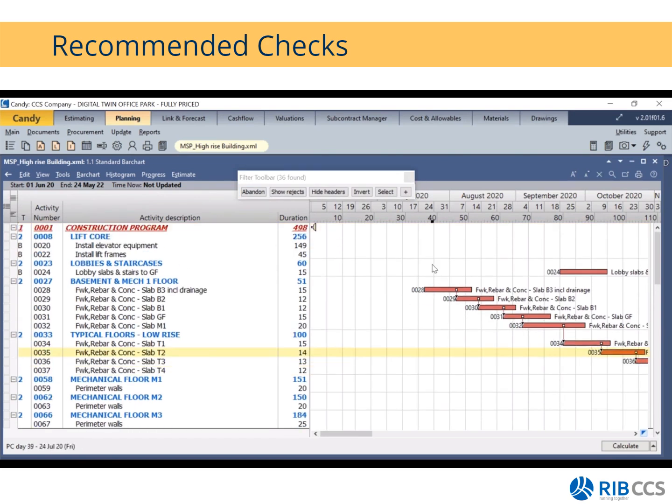those open-ended activities. All right, if you have a B-type activity, and if there's no succeeding activity that's going to happen after it, you can introduce things such as snagging or handover or whatever the case is, and then just link it to that last final check that you would like to do before the actual contractual handover date. So that is for your B-type activities.